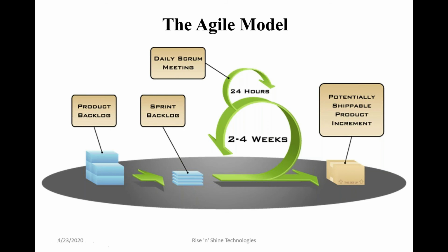The sprint, in our Agile terminology, is a small duration, that is 2 weeks or 3 weeks or a maximum of 4 weeks. They decide about that. Suppose the login functionality needs some 2 weeks to implement. That will be started as one sprint, which has some specific duration, that is 2 to 4 weeks or whatever plan they have.